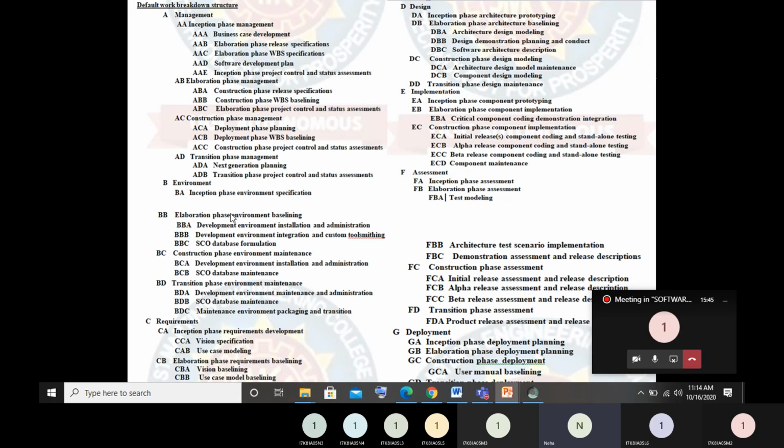Another thing is that your evolutionary WBS, the structure you are watching right now, needs to be tailored to project specifics. One is the scale of the project: larger projects will have more levels and substructures, but it will not go beyond the workflows. Next is your organizational structure. Projects which include multiple organizational entities can introduce constraints which are required for the allocations in the WBS.